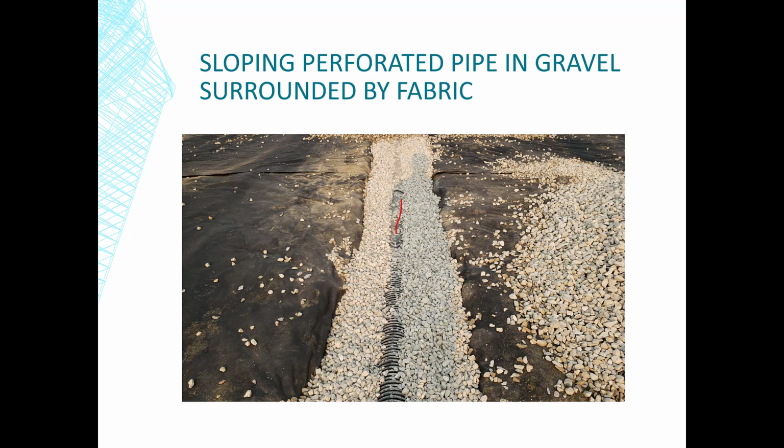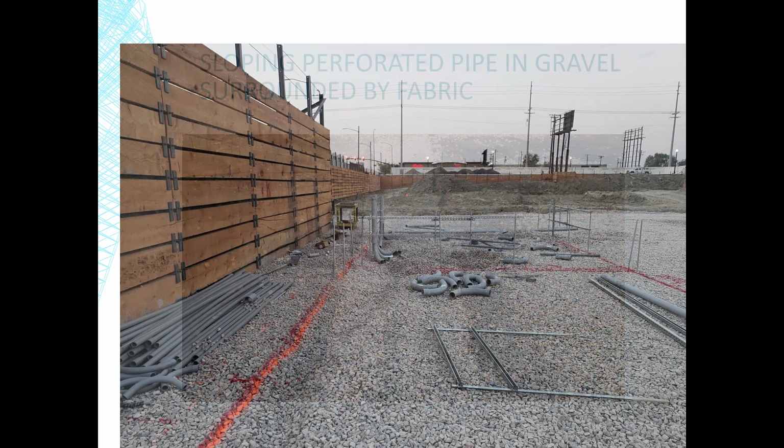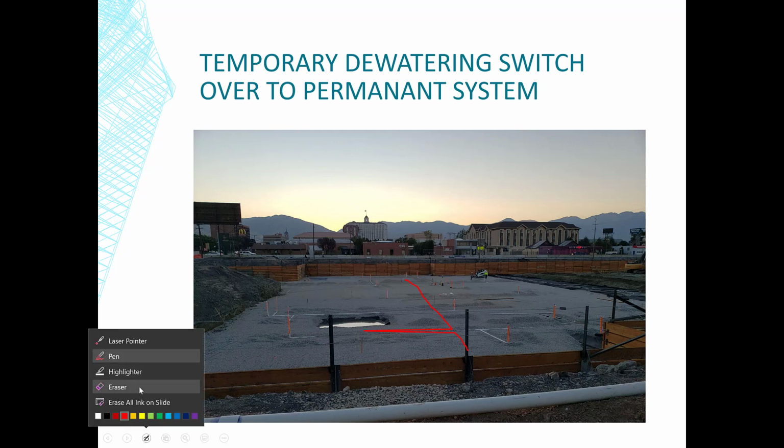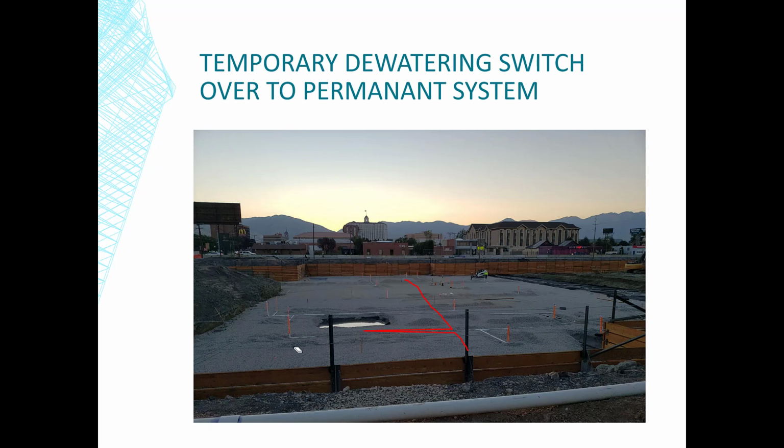So they've picked an elevation they think is economical and will work for the permanent building. But obviously, when you're using the permanent system, there are problems when it doesn't get low enough for construction in all locations.